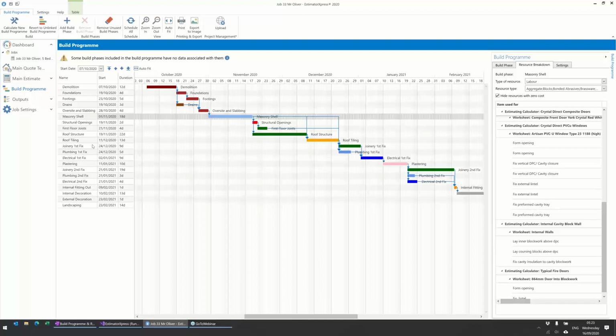If you take roofs for example, and the cutting list information has been calculated within the estimating calculator, it will use that information to reschedule the timber from the meter run price to actual timber lengths that you'll be ordering. And it will look at the job and say, well, you've used so much paint, so I'm going to pick a larger tin or a smaller tin. So it will do some sensible product substitutions within your estimate, by looking at the entirety of your job. And then it will take it through to preparing orders for that.